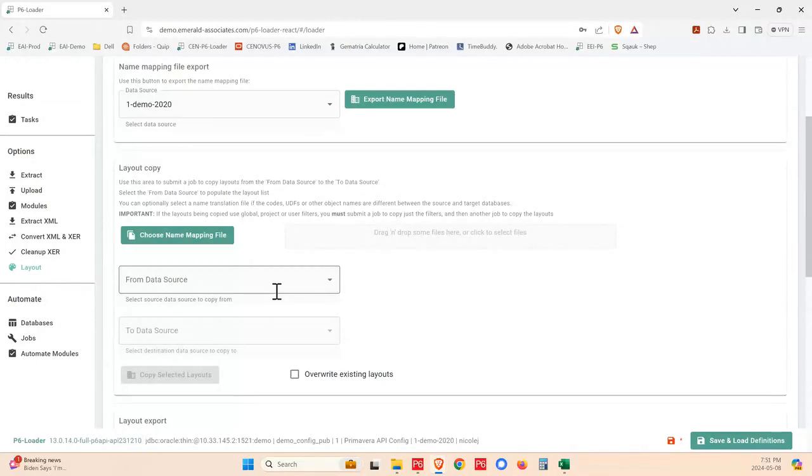And you need consistent coding to make that happen. I can't call my responsibility code RESP and Sue calls it responsibility. That doesn't come together. We need to make those the same so that we can get that kind of dashboarding. So this is huge. It's every client that we're working with, that's what they want. They want this standard reporting, dashboarding, so they can compare projects against each other. So it's a big thing that we're working on across the board.